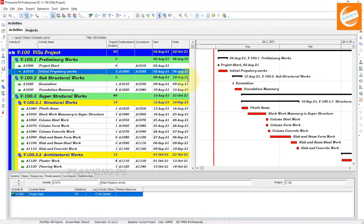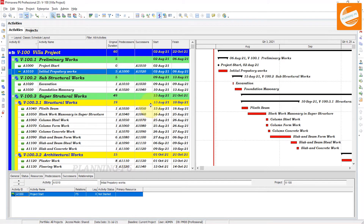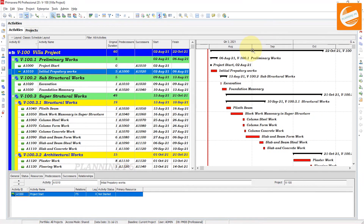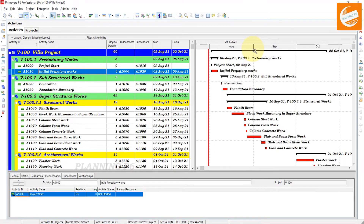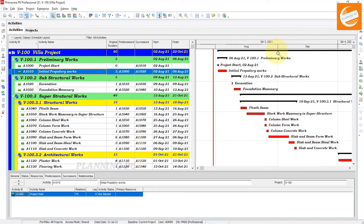After scheduling, add two columns: Predecessors and Successors. This lets you see which activities are predecessors and which are successors of each activity. Then zoom in on the Gantt chart.